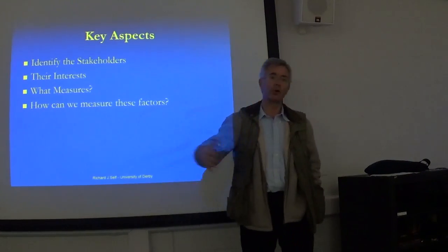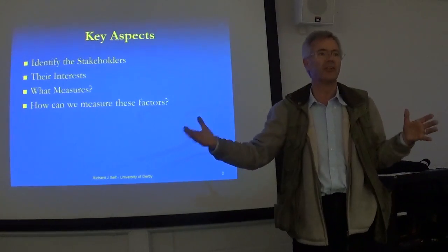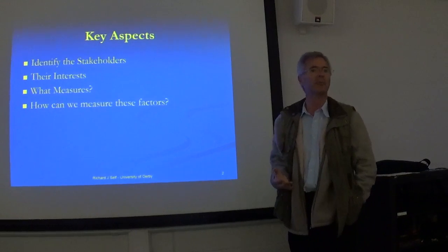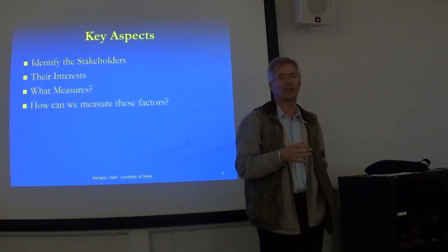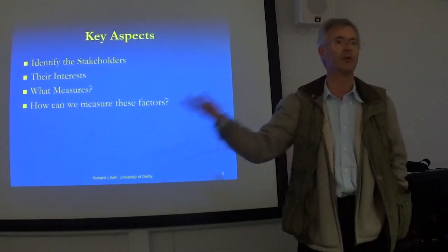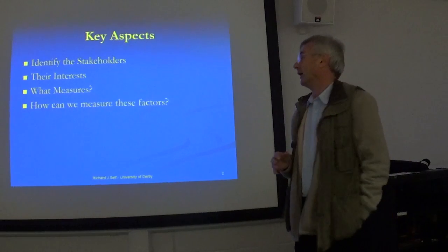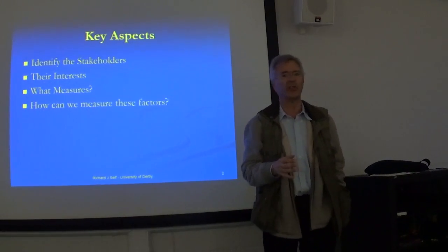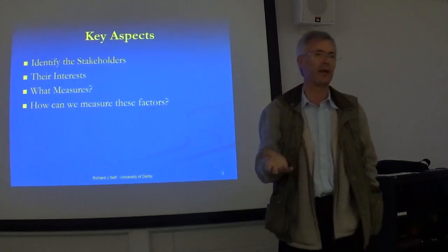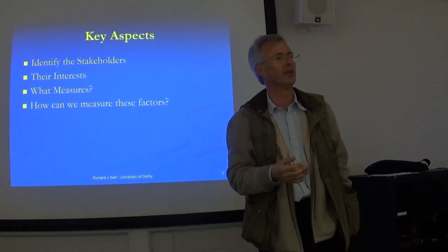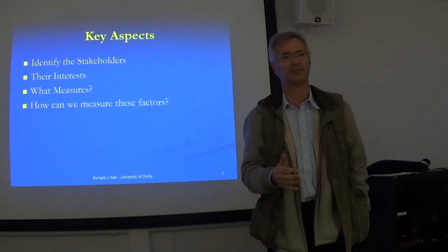You see, when they were doing the testing, they'd probably got 1,000 records in that table. Now, 1,000 records, however big the table is, is going to fit into the 4 gigabytes of RAM that that processor had associated with it. When you've got 50 million records, it's much less likely. So it's having to read the whole table row by row and try to find the answer. I don't suppose anybody else has ever done that since then. That has been logged in the SAP implementation records, I would suspect, from as long ago as 2000 when we found this: please remember, if you modify this transaction, check you've got an index on it.